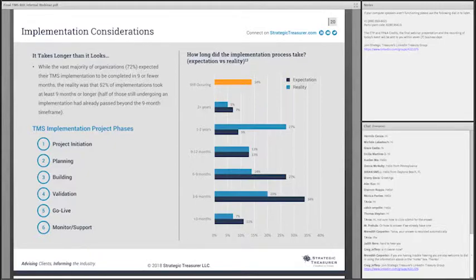Is that going to be a part of this one encompassing project, or is it going to be broken up into 2? Often the timeline can be very distorted because not enough adequate time is devoted to the RFP process separate from the implementation process for the entire project.